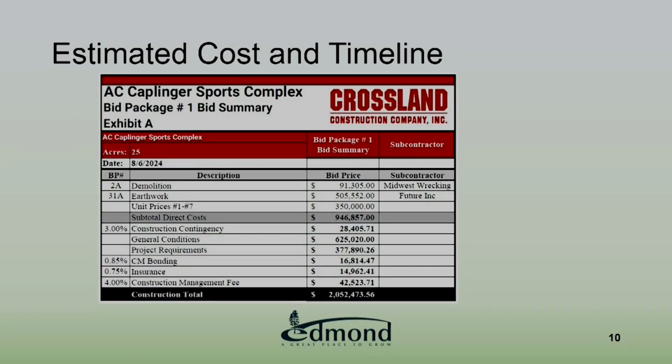They came under, and this unit price item here is basically for unknown soil conditions, built on a former landfill site. That's to allow testing to happen as they excavate, and that money is there in case we need to haul it off and bring in new topsoil. It could be the case that it's all great and nothing's found and we don't have to spend that money, but that's what it's there for. It'd be done by unit price.